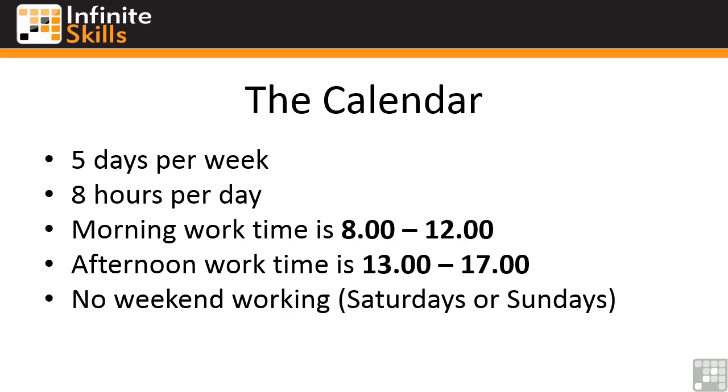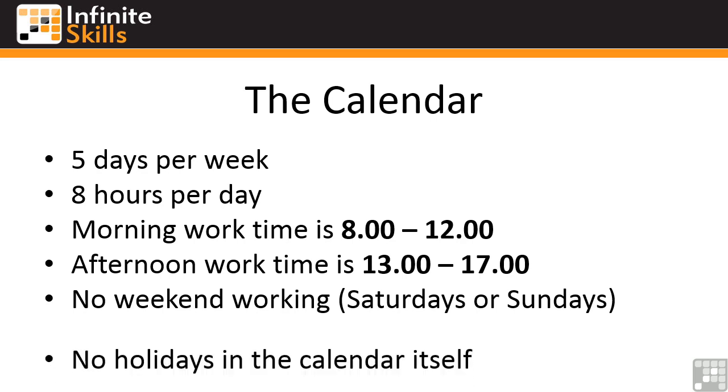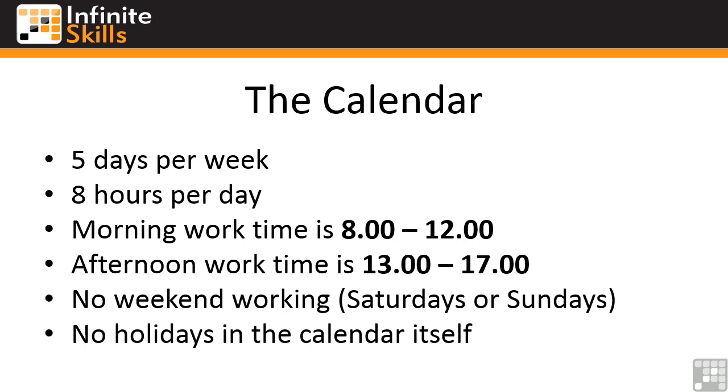No weekend working is included in the calendar. Obviously we can add that, and none of the bank holidays are included either. Now that is an important item to remember to add into your calendars, all the public holidays that effectively could make a difference to how long your project will take.